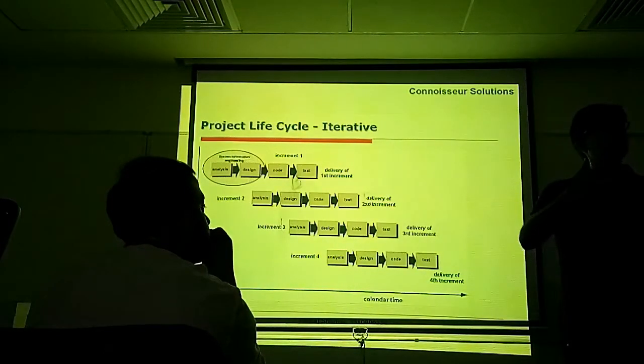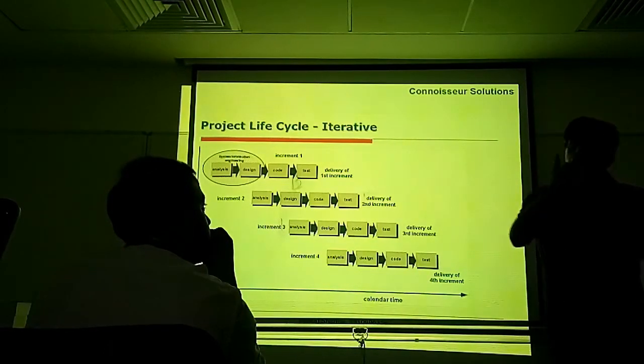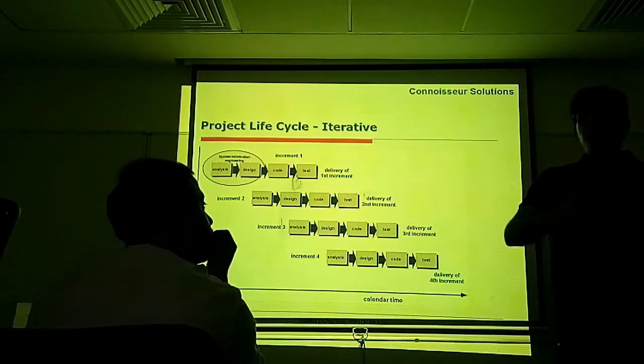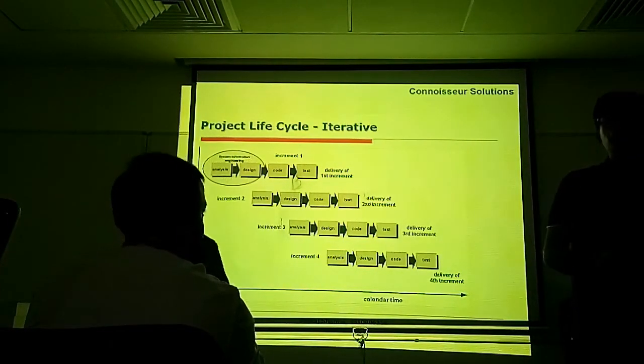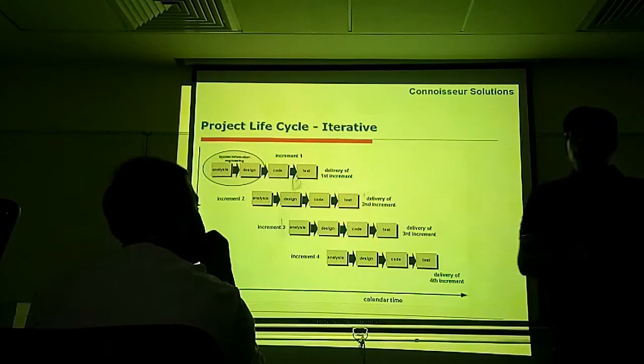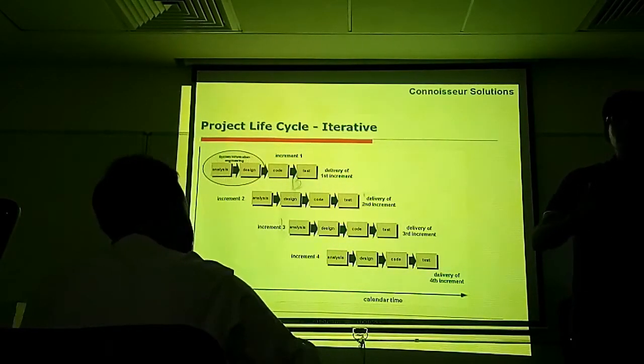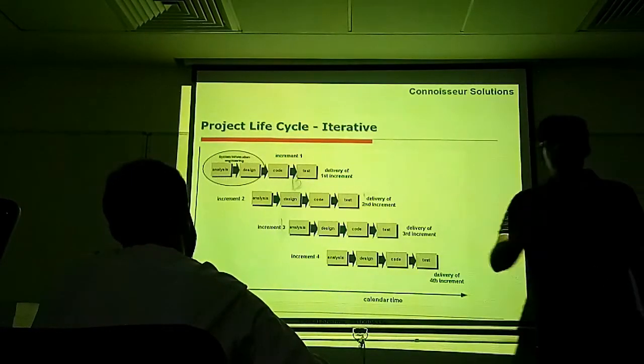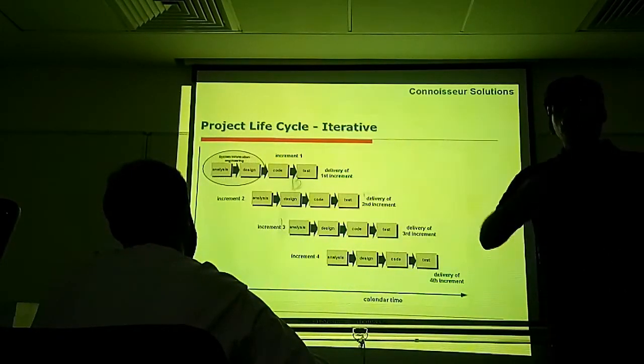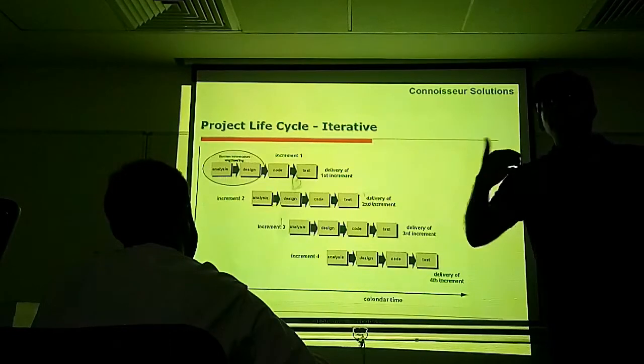For example, based on the retrospection, you can come out with a conclusion. What should I start doing in the next phase? What should I stop doing? What should I do more? What should I do less? So this is iterative life cycle, where the project is rolled out incrementally in phases.